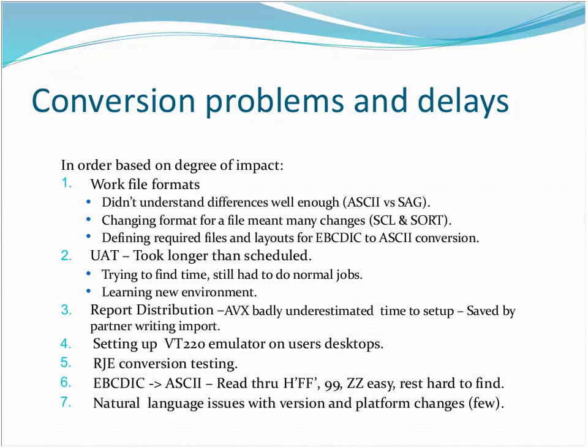And we had a few problems because of having the formats. We had to have a conversion program convert the EBCDIC to ASCII, and it needed to know the exact formats. We took a while to figure out exactly what files we needed, to get all the formats defined, and which files were really the same formats. It just took a lot longer, and we had way more problems than we ever anticipated.